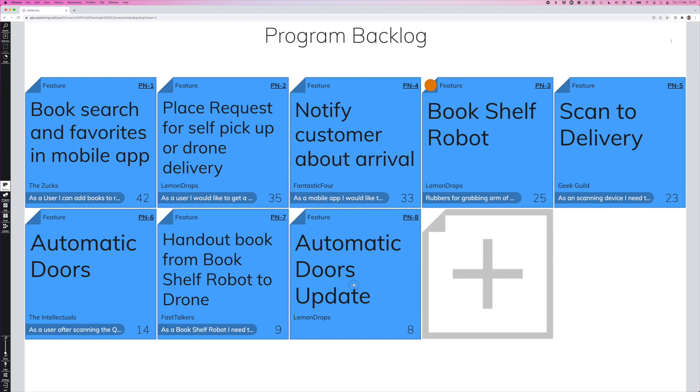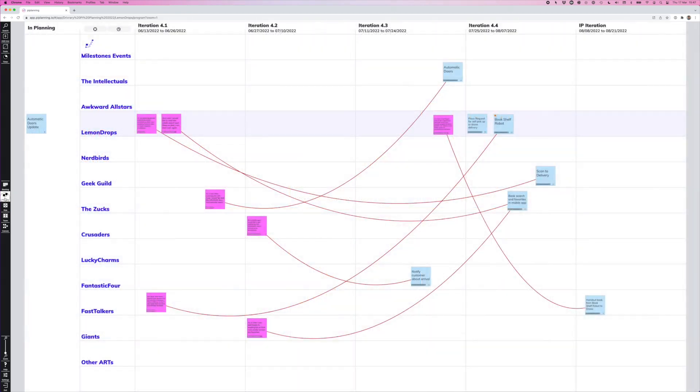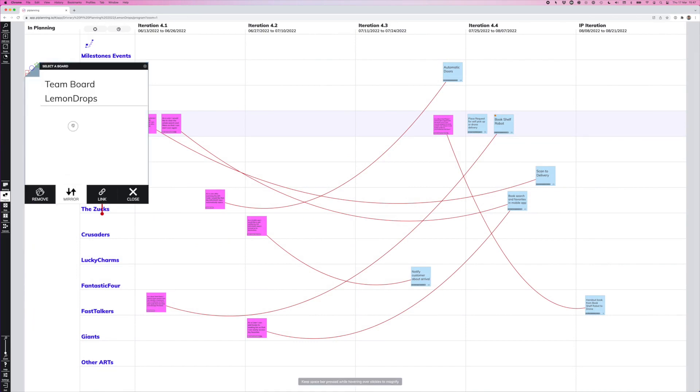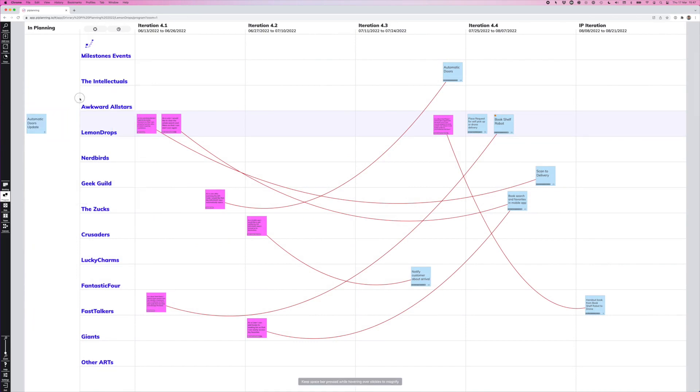And you need to keep an overview if your teams pick the features with the highest value. Because once it's assigned to a team, it appears on the program board in the column called in planning next to our team name here on the left side. And now what we can also do is we can mirror this feature onto our team board as well, so that we can also build feature swimlanes on our team board, which adds to our transparency and help with alignment.